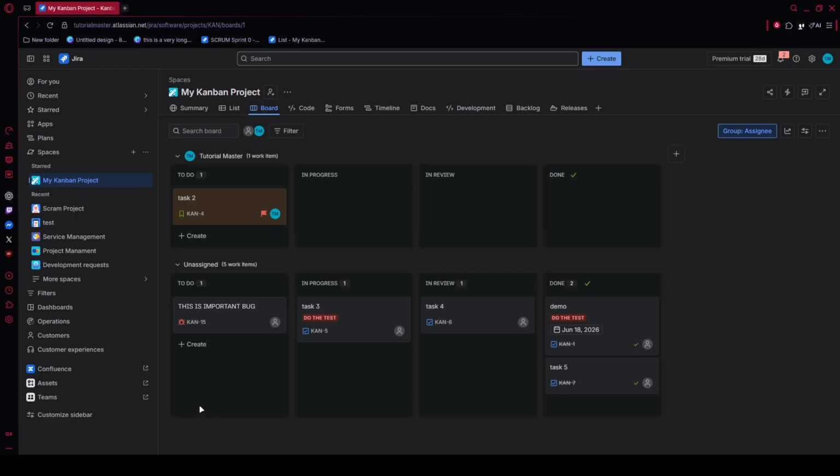First, let's prepare the CSV file. Open your spreadsheet editor or code editor and format the file carefully. You need to include an issue key or issue ID column so Jira knows which issue each comment belongs to. If you want to add multiple comments to the same issue, place them in separate columns on the same row, and label each of those columns as comment.